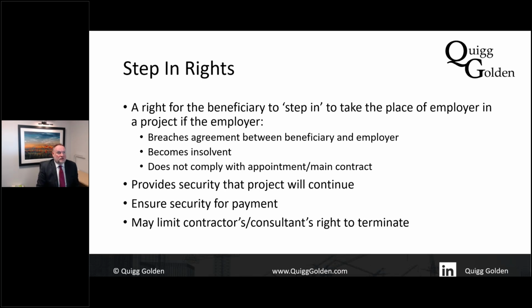So it means that a project which is well underway can be finished out even if one of the parties becomes insolvent. In the same way, if we have a very specialist subcontractor in place, then the warranty between the employer and the specialist subcontractor may provide that they have the right to step into the shoes of the main contractor in certain circumstances, mainly the insolvency of the main contractor, and take over the subcontract.